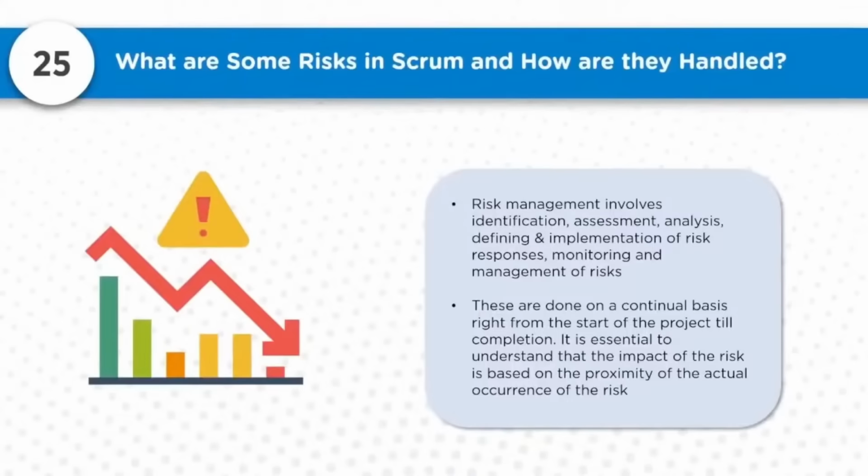So when that is not happening, as an example, I am taking the involvement of customers, the collaboration part of it. If that is not happening, the impact level is not equal to the impact level when this happens at the start of the project, though it is the same type of risk we are assessing. That is the reason you should keep assessing each of the identified risks as the project progresses, and check whether any new risk is introduced as the project is progressing.